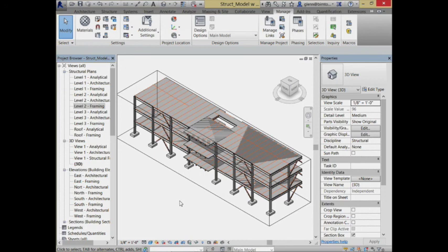This may be zone A, this is zone B, this is zone C. So we can just put that into our coding scheme. This is 120A, 120B, 120C. This is 220A, 220B, 220C. And you can very quickly adjust a construction schedule to be much more refined by just changing those tags, and always keep it mapped to whatever your task schedule is.